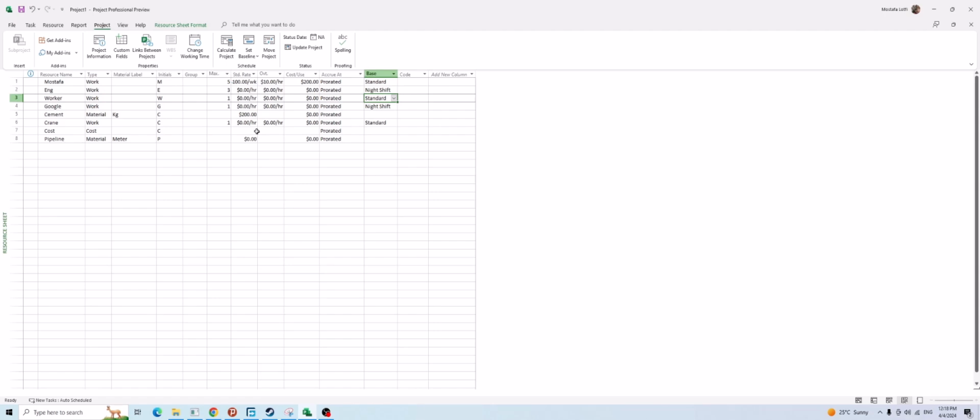You cannot see if a resource has a different calendar, and there might be a conflict. Based on my experience, it wasn't very smooth and handy for troubleshooting and reporting. So I personally prefer to create a very separate solid calendar for the resource and assign it directly.